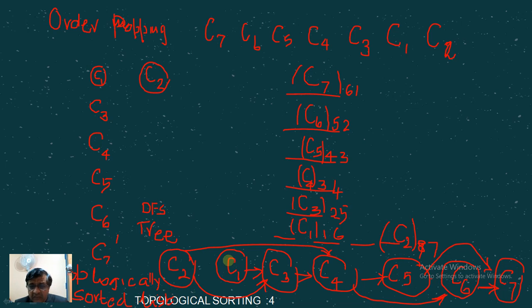If we know the duration between C2 and C3, we can indicate it over here and we can go along the path which consumes the maximum amount of time. That becomes a critical path. This will answer questions like by what latest day the project will be completed.